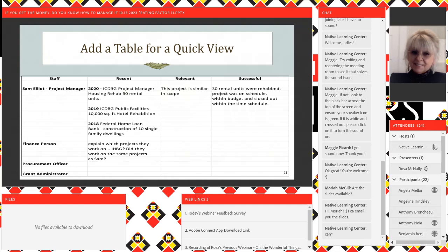And you're going to give examples of the procurements. So we know that Sam, based on what we just read, he's got experience. He's already done a lot of projects. They're a force account tribe, and so they're going to do as much of this within their own tribe as they can. But they've got to go out for bid for electrical. They've got to go out for bid for their plumbing, for their mechanical.